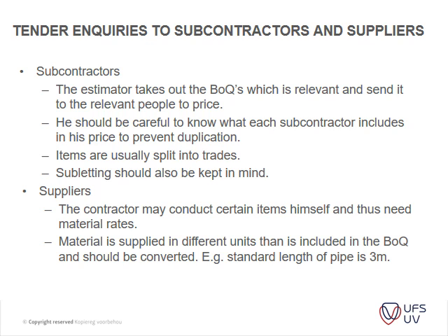Items are usually split into trades. Yes. Subletting should also be kept in mind. For instance, your subcontractors may sublet certain work to other guys. Another good example, which I encounter quite often, is that your electrical guys usually have a contingency at the end of their bills of quantities, and then in the main bill we have a contingency as well.